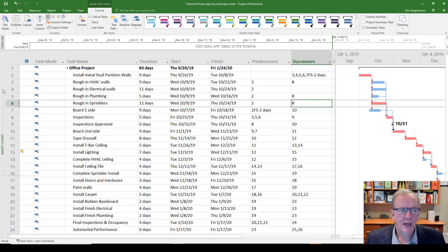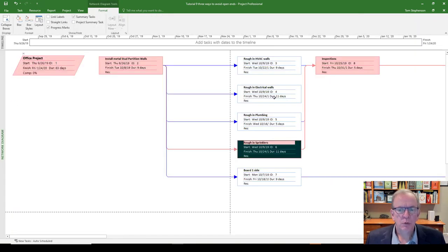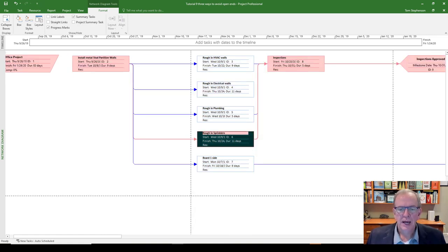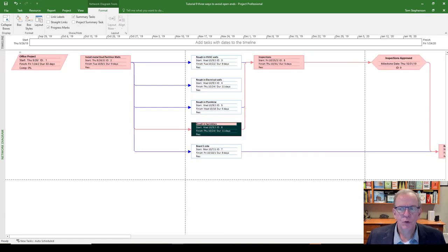I click on that, right click, okay, so all the way to the left, right click. There's other ways of doing this, of course, and I go to the network diagram. So I'm going to click network diagram, and network diagram is where we have what the project looks like, the network. It's not like the Gantt chart where it shows you linearly how long something takes. So the length of these joining bars means nothing, but what it does show you is the logic, the predecessors and successors between the activities, so you can get a good sense of what's going on.